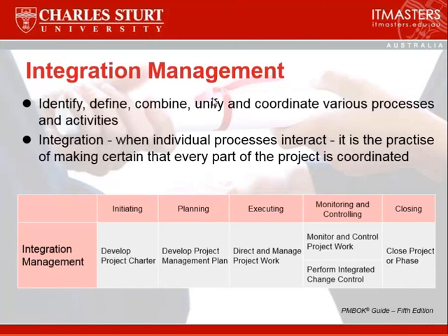When you've got conflicting aspects to different processes, for example, you want to reduce your time or shorten the schedule, that probably means you have to increase your resources. It probably means you have to increase your costs, and you have to balance all these things up. So integration is all about making sure that all the other processes are aligned with each other.